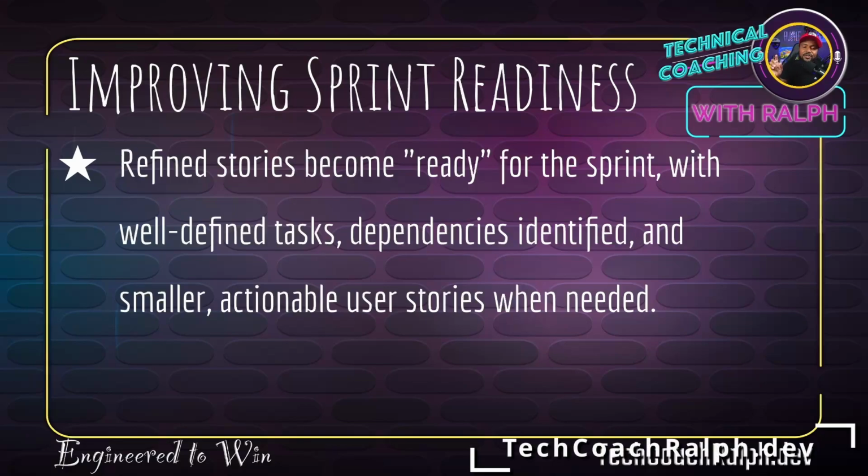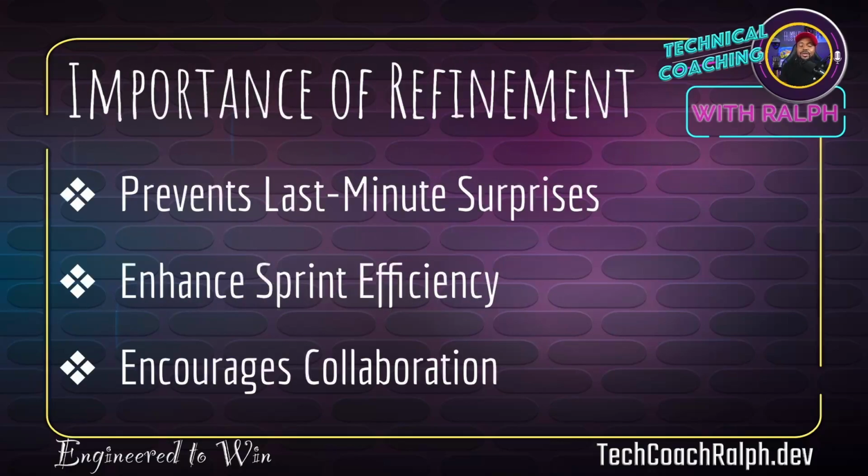We know if a story is blocked by another story or by another team or whatever the case may be, what do we need to do? Like maybe a story is blocked and we cannot pull it into the next sprint. Or it's very important that we need to. So now we go and we talk to whoever is the blocker so that we can get that resolved and we move forward.